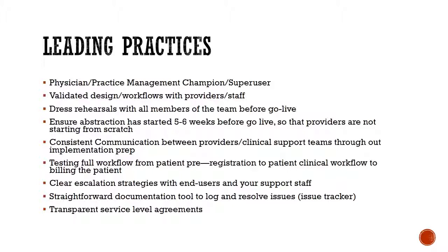A lot of these we've touched on. One other thing I want to talk about here before we move on is to have a straightforward documentation tool to log and resolve issues. For instance, if you are a practice that's affiliated with a larger hospital and they have an issue tracker or some sort of tool, make sure your staff understands how that tool works. Make sure your staff understands the service level agreements that your providers have with that hospital or with the vendors, so that you can have a consistent way of tracking and documenting your issues.